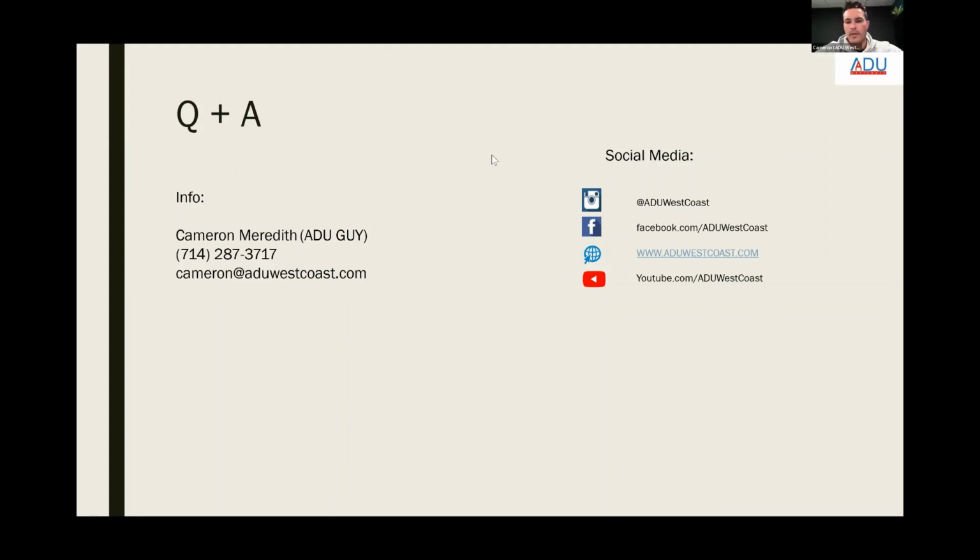Great question. So here's the rule. Any new construction in California, including an ADU, has to have solar, quote unquote. Depending on the city, we've done a bunch in Long Beach, and they've made us do solar ready. So basically the plan is ready for solar, but they never made us install the solar panels. On the other hand, we have Lakewood right now where we're pushing a project through, and before they didn't require the solar panels, but apparently we're going to find out in the next week or so that they are. So it always varies between cities, but if you're building a ground up ADU, or ground up anything, err on the side that the state or city is going to make you put solar in. So yes, if it's ground up, yes. Got it. Thank you.